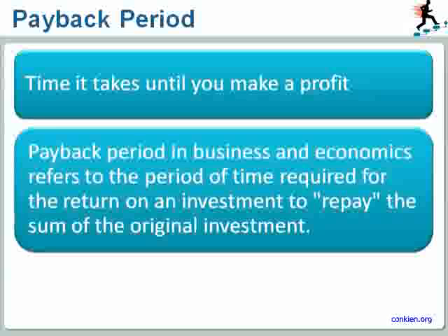A $1,000 investment, which returns $500 per year, would have a 2-year payback period. It is intuitively the measure that describes how long something takes to just pay for itself. Shorter payback periods are obviously preferable to longer payback periods, as long, of course, as everything else, the risk and all the other factors, are equal.